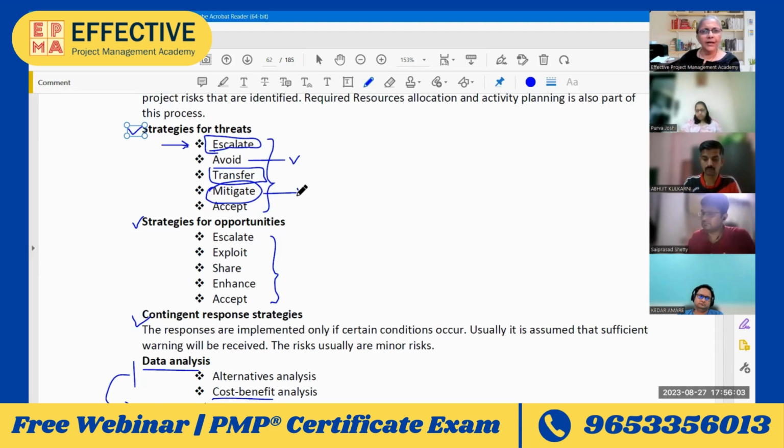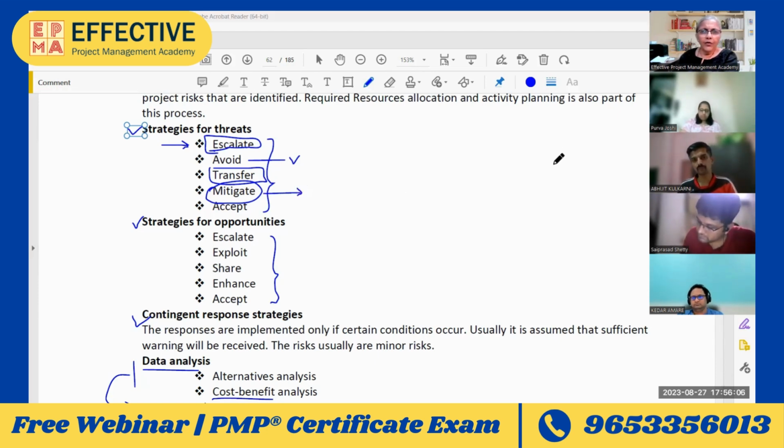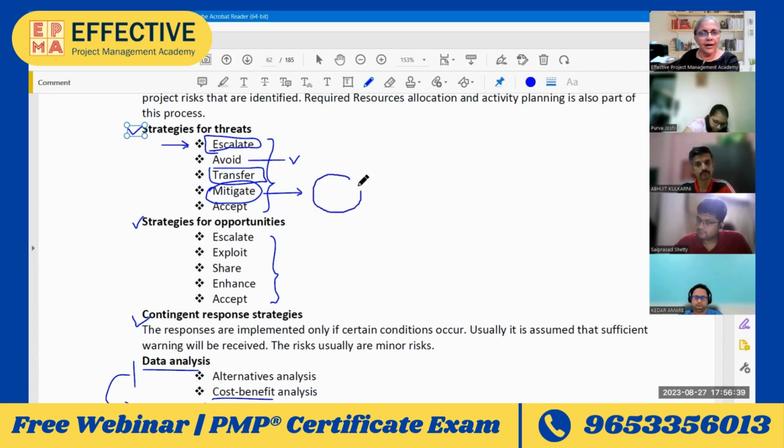where the customer is absolutely fussy about quality. They say quality will decide if we accept or not. We want the best quality, we are ready to pay, but we want you to deliver the best quality. My team is good, but if the customer is very fussy and the risk is identified that the customer may not accept if the quality is not to their satisfaction, let us arrange for a training which will perhaps help my team deliver better quality.